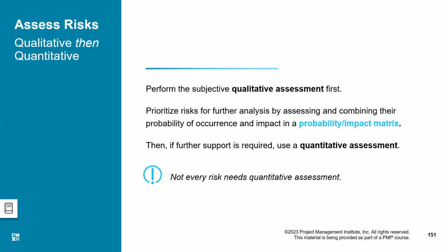Quantitative assessment can follow, but that is not for the purposes of individual risk. That is to assess the cumulative value of risk of the whole project or a portion of the project where the risk is high. I want to recognize that portion of the project, and we don't want to go into the detailed calculations of every risk. Only some of the risk will qualify to go to the quantitative level.